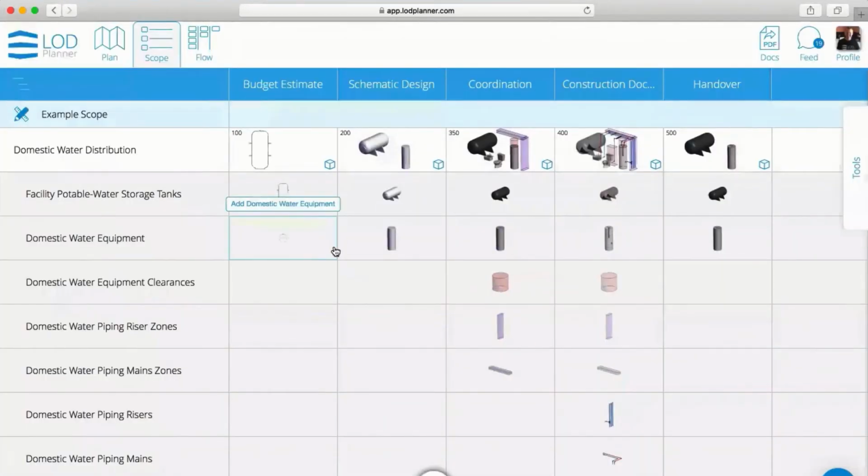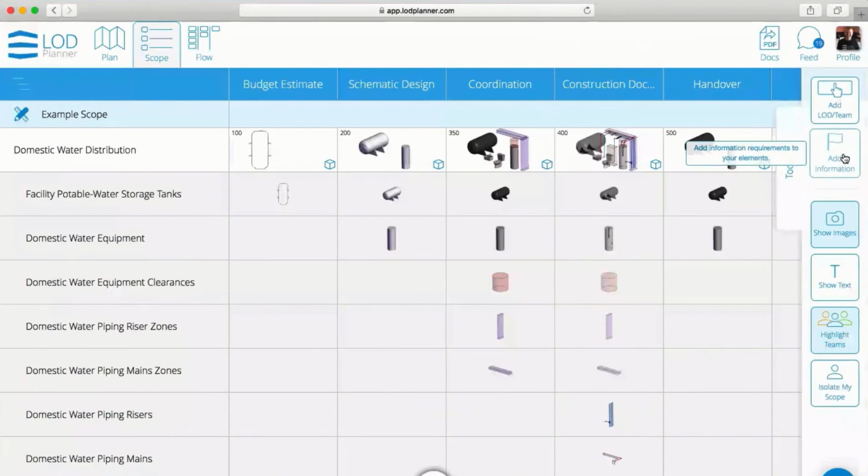So very quickly we can define what an as-built is and what that means for this owner. Clearly, you can see here an inverted bell curve showing what is important at each phase, and maybe there are fewer elements that would be important, but maybe they need to be an accurate as-built for the handover at that point in time. Yeah, we've seen many companies take this approach to the owners and either have them gain access to the project so that they can fill in their own information, or we've also seen them just meet and go through this, system by system or element by element if needed, and really narrow in on the exact information that was needed for that project.